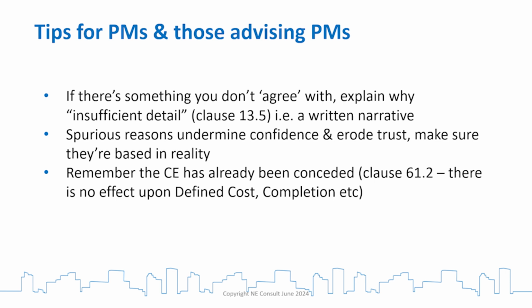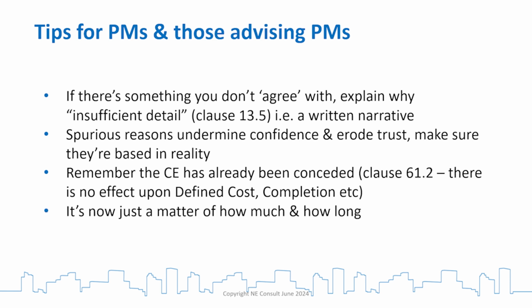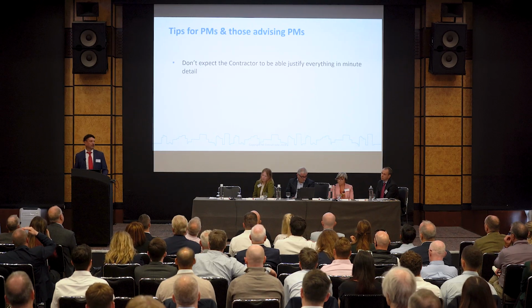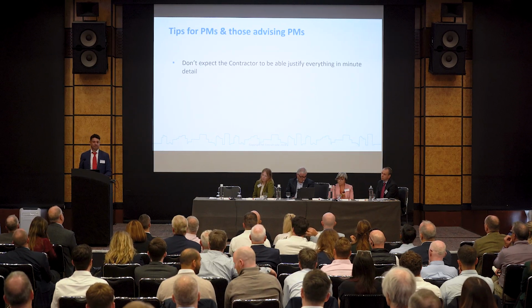Remember that the CE has already been conceded. There's no argument about principle at this stage. It's just about time and money. How much and how long? The principle went a long time ago. Don't expect the contractor to be able to justify everything. They won't have records for everything, for how long it took to do everything. Delay often doesn't happen in a nice, neat, self-contained way where you could record it on a day worksheet. But you will have other evidence.